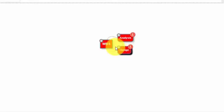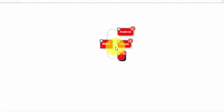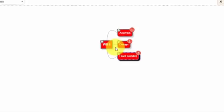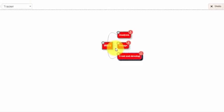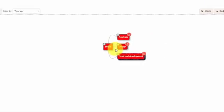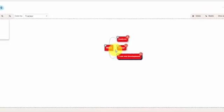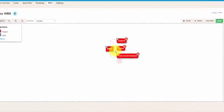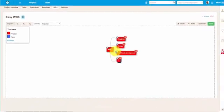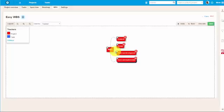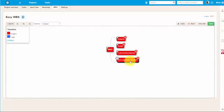After that, we will add design and design will be followed by front-end development. After that, we will do back-end implementation. Using WBS, I can easily define the deliverables, which are these chunks of work over here, which then will be further broken down into specific activities.